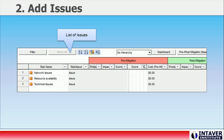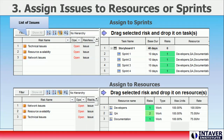Issues are perfect for incorporating both risk events and uncertainties into an Agile model. Like risk events, they have an impact on schedule, cost, and technical performance. And like uncertainties, they have a 100% probability and can be modeled using three-point estimates with statistical distributions. The team identifies known issues they believe will have a significant impact on the successful delivery of the sprints.